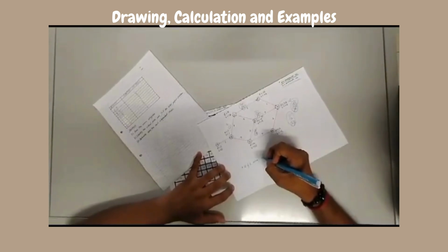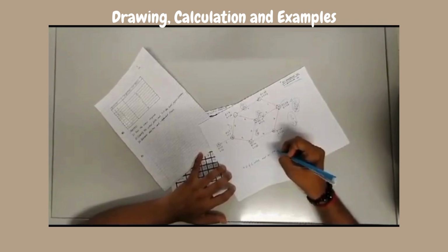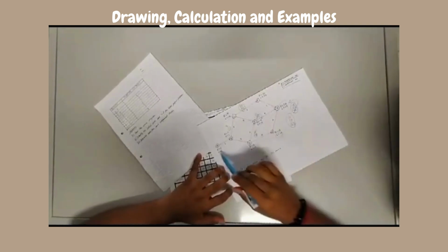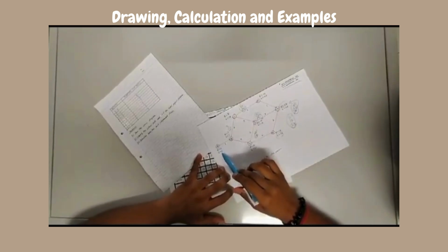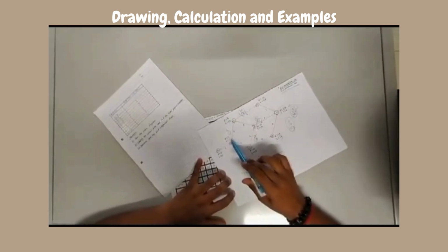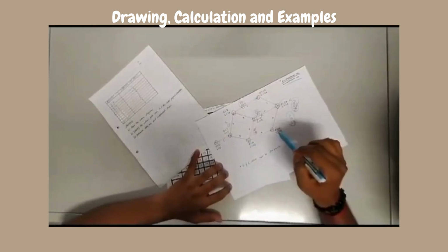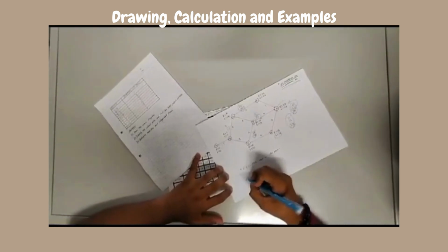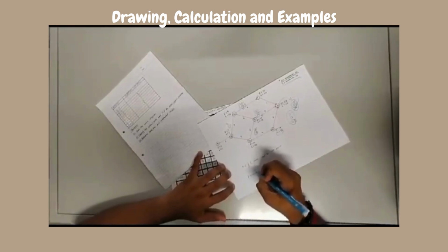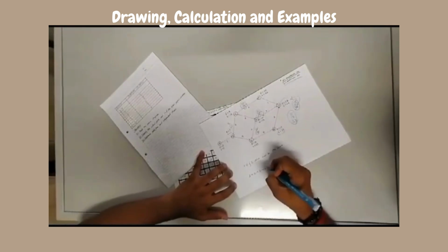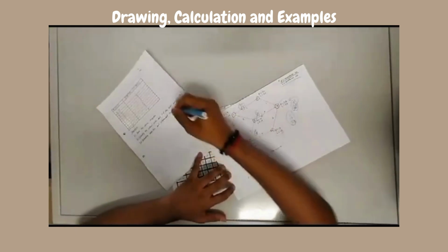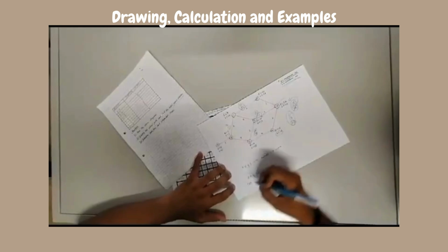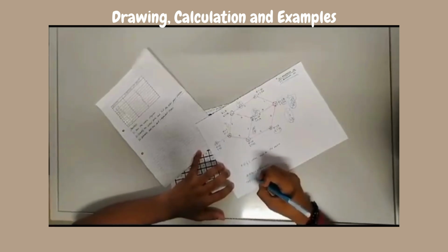Looking at the whole diagram, for A the E and L values are the same, for B the same, for D the same, followed by G and also H. So the critical path is A to B to D to G to H. Now they are asking for the total project duration. The total project duration is 23 days.